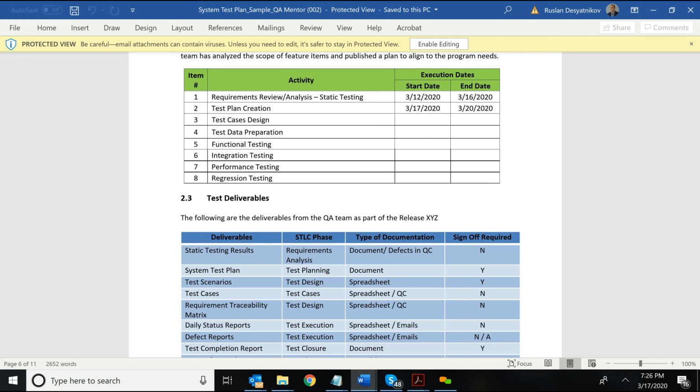So you will remember that. If you're looking at the user story and thinking, well, for this user story I would need to build about 20 test cases, and on average you do 12 to 15 per day, then you will say, I need 1.5 days just to build it. And then we execute probably the same. So, 1.5 to build it, 1.5 to execute it, total 3 days. So in 3 days, I will complete testing on this user story. That's it. That's what you have to do.